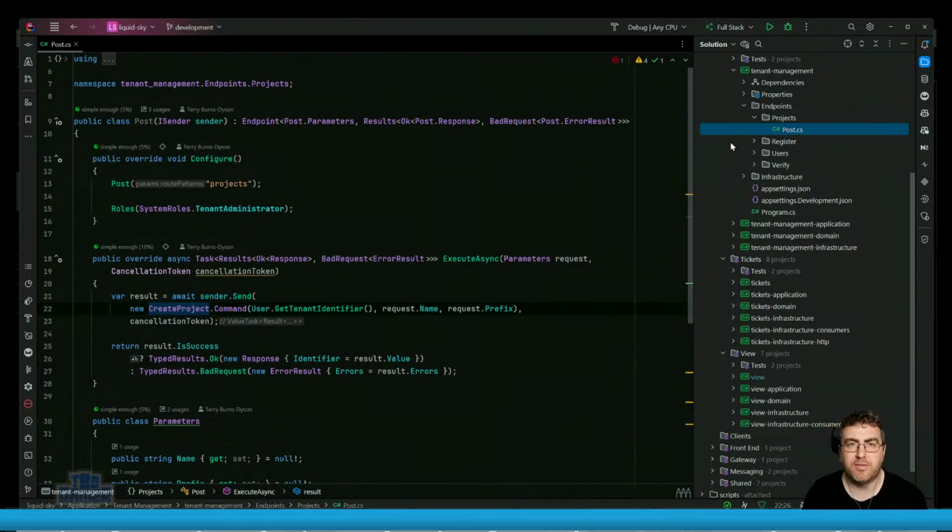Yeah, it's kind of work that, and I disagree with pointing spikes, by the way. I think that is a ridiculous practice. Spikes should not be pointed. If you can point something, then you've got work. I don't think spikes should be pointed. I think spikes should be accepted as lost time.